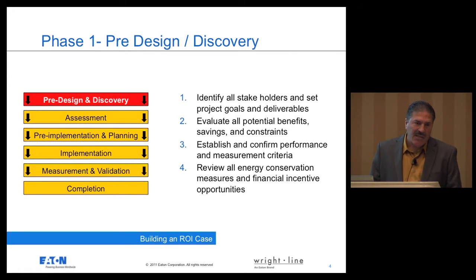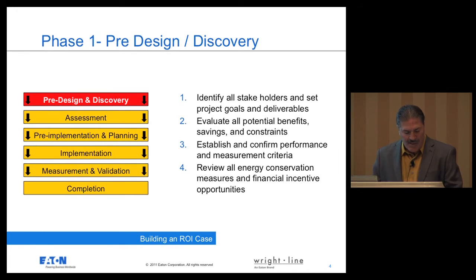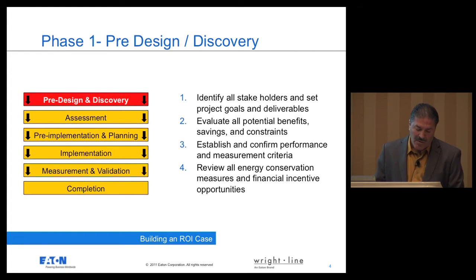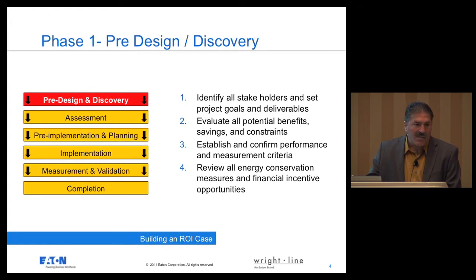It's important to understand the key performance indicators and barriers in the data center — for example, budget, time, performance, and the motivation for doing the containment project. All of these are important to weigh in at the very beginning. Design recommendations should be made as early in the project as possible to avoid change orders and maximize productivity. If government utility rebates and incentives are available, it's also a good time to establish those up front, as they will have a major impact on what your implementation plan looks like.